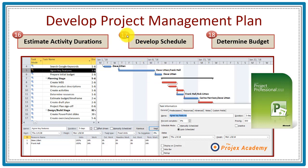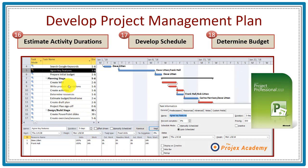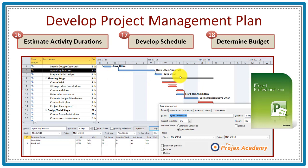Having done that, step seventeen comes very quickly — because you've shown the linkage, you now have your schedule automatically created within Microsoft Project. Step eighteen within planning is determine the budget. Microsoft Project will have added up all the costs of all activities and give you a total budget number for the project, and indeed for each stage shown as summary bars. You can go into these and find out the cost, work, duration, and resources for each phase.